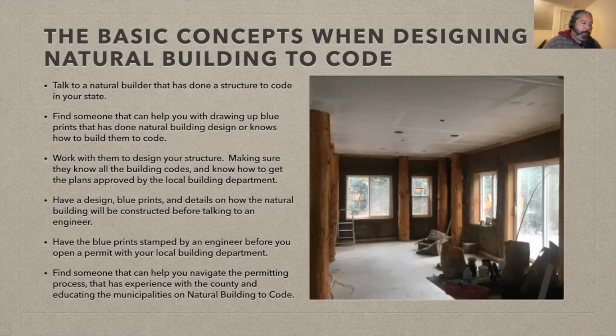Find someone that can help you navigate the permitting process, that has experience with the county and educating the municipalities on natural building to code. So great if you have an engineer, great if you have an architect, great if you have a builder. But if they don't know how to communicate with the county, if they don't know how to educate them on what we are doing as natural builders to make sure that we are following the rules and building to their code standards, then they're not going to approve the building. So it's important to educate them.